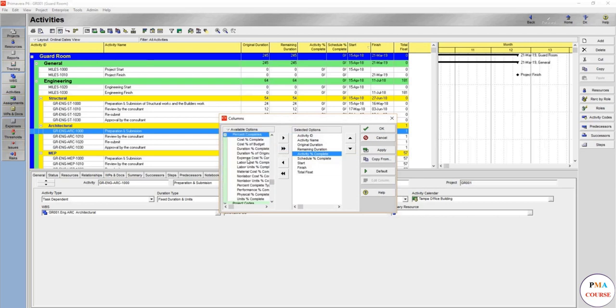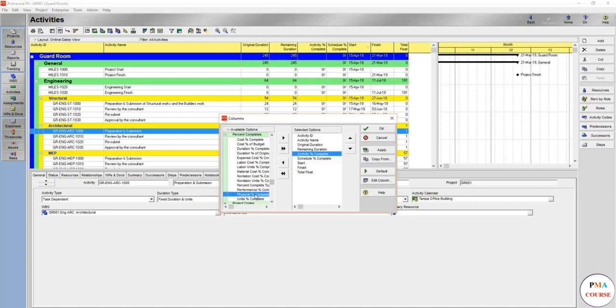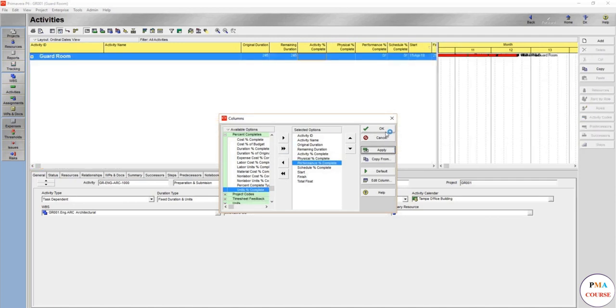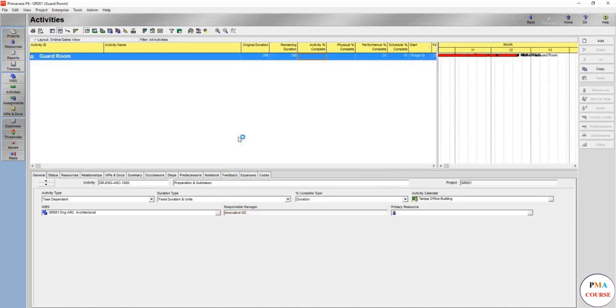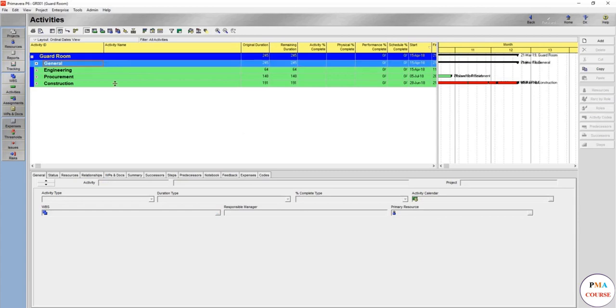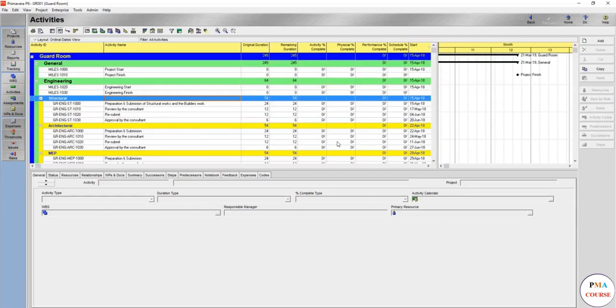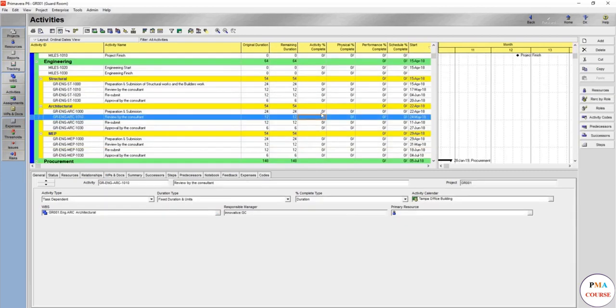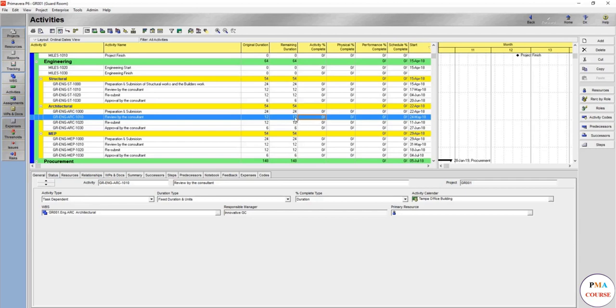We might add physical percent complete as well as performance percent complete. So when updating, when you make this activity started, you will take let's say for example 50%, this will automatically be 5. You are also going to see it in the update lecture.